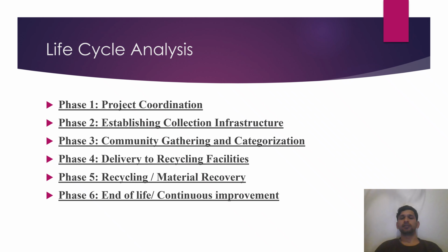Slide 5 is about life cycle analysis. Here you can see the life cycle of the entire project divided into 6 phases. Phase 1 is project coordination, where planning, budgeting and partnership building take place. Phase 2 is the establishment of collection infrastructure. This includes installing collection points, acquiring safety equipment and arranging transportation.